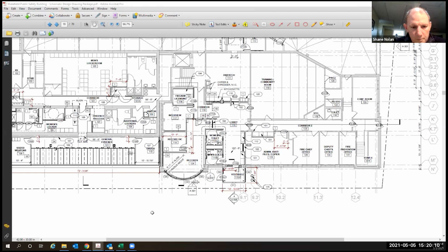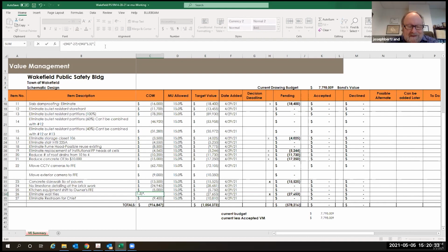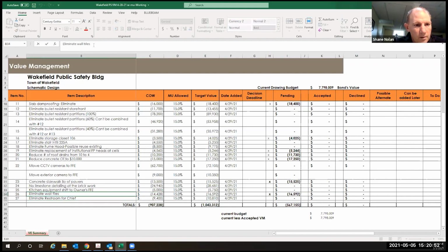So why don't we reduce it by some percentage. 60%, 70%? And we'll look at the women's room. We tend to put more tile in than less typically, but we'll look at cutting it back, way back. Are the men less messy or more messy? Don't know. So Don, do we want to just make this 60% for this exercise? Yeah. You just have to do the times 0.6 on the other one as well. Just say eliminate tile on wet walls only. The wall tile. Keep at wet walls only. Yep. Tile on wet wall. Yeah, there you go. Thanks.